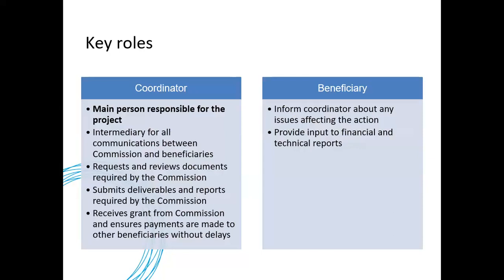The coordinator is also the person who will receive your reporting if you are a beneficiary. So the beneficiaries prepare the reports and send them to the coordinator. The coordinator is then responsible for reviewing these reports before submitting them to the Commission.